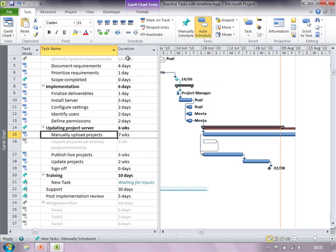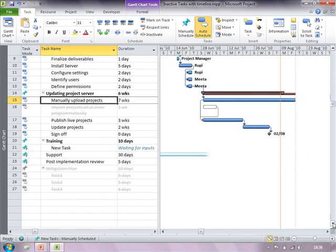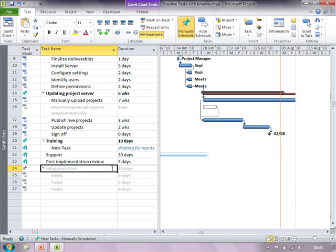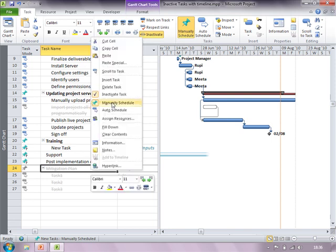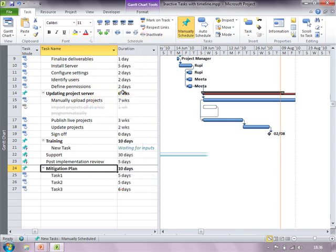For example this project of mine is associated with a particular risk. As a mitigation plan I have written down three activities which will be used to resolve the risk. Risk is something that is foreseen, it has not yet occurred, so I have inactivated the mitigation plan activities. The moment I know that the risk is going to occur I would like to mitigate the risk and so immediately I will just activate these tasks for mitigation plan in my project.